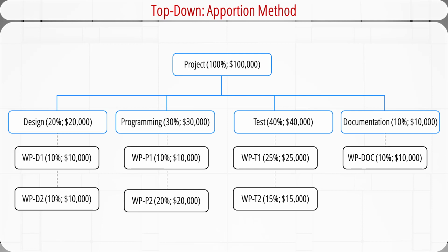The third top-down method we will introduce is called the Apportion method. It is used when projects closely follow past projects in features and costs. Given good historical data, estimates can be made quickly with little effort and reasonable accuracy. This is a commonly used method in projects that are relatively standard but have some small variation or customization.